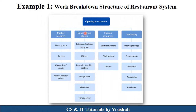Now, here are different examples of WBS structure. This is a work breakdown structure of a restaurant system. First, the project name is 'Opening Restaurant,' then it is divided into multiple tasks. The first task is market research — you need to do research before opening a restaurant, with subtasks like survey, identifying competitors, market research, focus groups, etc. The second task is the construction phase — construction of the restaurant, including indoor/outdoor dining area, kitchen, reception, storage room, washroom, parking lobby, etc. The third is human resources, with subtasks like staff recruitment and staff training. The last is marketing, with activities like celebrity endorsements, advertising, brochures, etc. This WBS shows the proper organization of the project and makes it easy to identify which tasks and activities need to be performed.